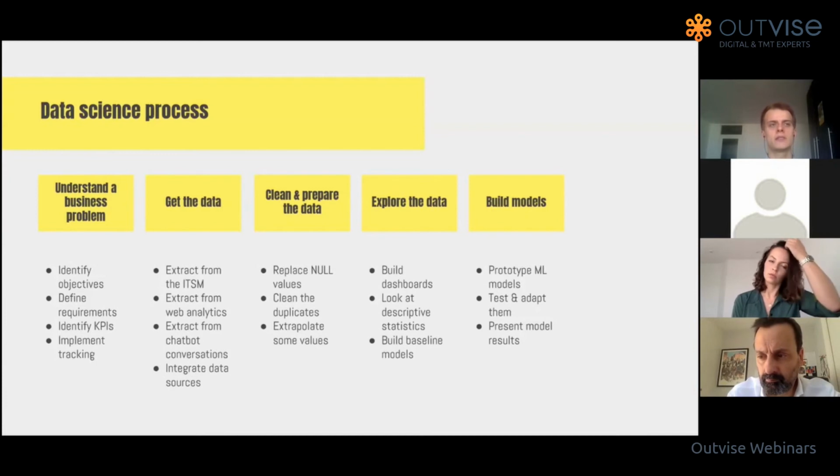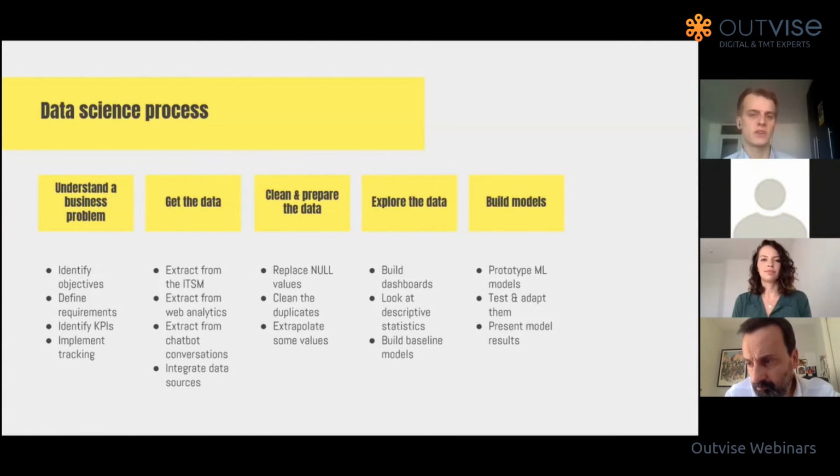At the same time, there are rules of thumb, of course. If you train 5 models, for example, of different model classes, it is likely that one of them will perform well enough, let's say, on the specific data set. So you don't need to train every possible model with every possible set of parameters, but you have to keep that in mind while doing your project planning for data science.